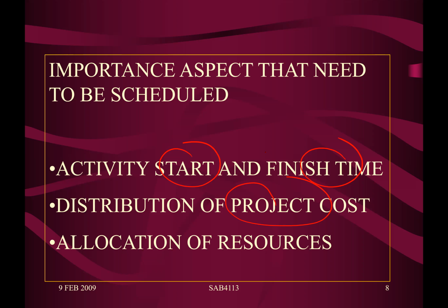It might not be pro rata, but in the academic world or for calculation purposes, for the sake of exams or whatever, we normally prorate. What does prorate mean? The 100,000 you divide over 2 months, so the first month would be 50,000 and the second month would be 50,000. But in reality, it will not be like that. Just for the sake of calculation, you do that. We do that because otherwise we are not going to be able to generate what we call the S-curve at the beginning of the project.